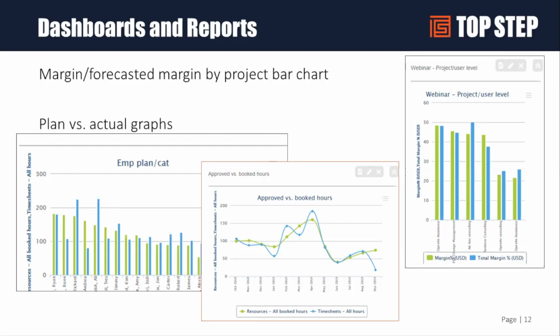All of this is very objective data coming from OpenAir to complement where you as a project manager are trying to understand, okay, how much of the work has actually physically been delivered, like the development of a report or the installation of software. Those tasks completion gives you the ability to say, well, how much budget do I have left versus how much work has been done, so I can understand where I'm going to go from a budget perspective. Okay.